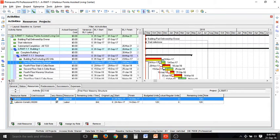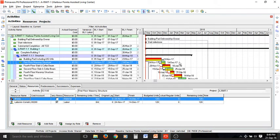Back to our project in the Gantt chart view, we can see yellow bars as the baseline. This is a tracking Gantt chart. As you can see there is currently no slippage or variance for our activities, and the yellow bars are perfectly aligned with the main Gantt chart bars because we haven't defined actuals yet.